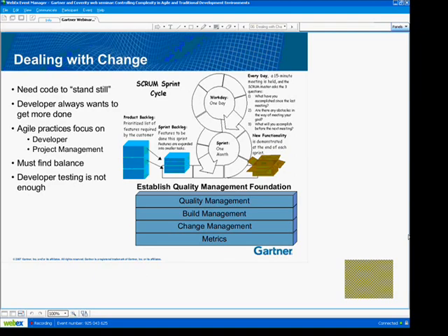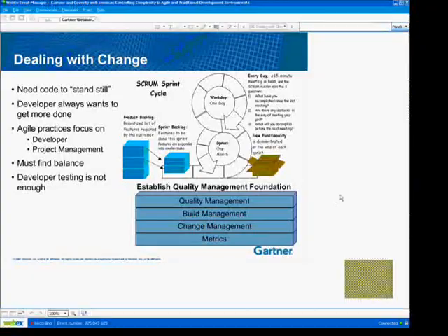So what I've found happens in most organizations, in teams that I've been on doing Scrum, and speaking with Coverity themselves, they've seen similar things, is most organizations end up shifting from a 4-week, 1-month kind of schedule to something that's more like a 6-week schedule. And that may be 3 weeks of new functionality, 3 weeks of stabilization. Teams I've been on, we've had 4 weeks of coding, 2 weeks of stabilization.